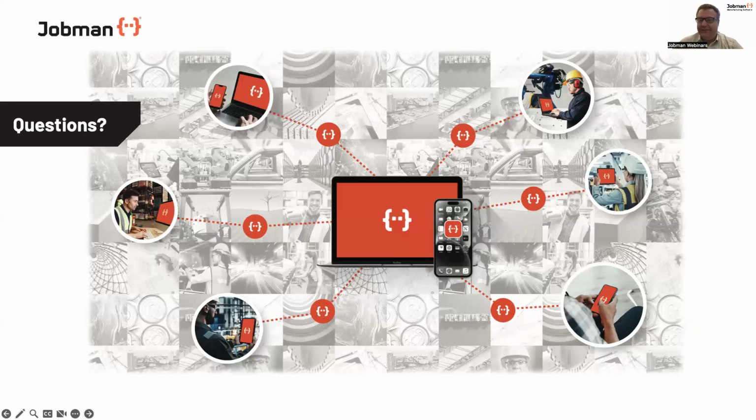Now, there's a couple of options here for you as a business owner to make that decision around what works best for you. If it's just like one item, like we've just stuffed up a whiteboard, we need to go grab another whiteboard. What most people would commonly do is just go into those job resource materials, add the extra board in, create a quick work order notification to send it to the team that needs to be done, and then grab that board from stock and use it up. It's probably something you sit on. If it's a bit more complicated than that and you actually want to measure the costing, the best way to handle that then is to take that job alert and turn it into its own work order.